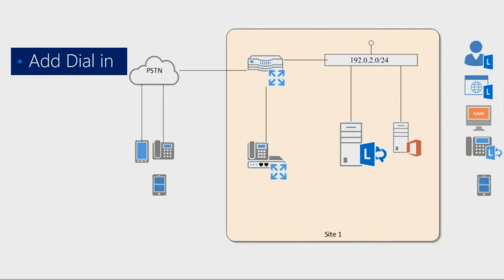But you'll also notice that there's this little puppy right up in here, which is called the gateway. That PSTN doesn't always have the ability to come straight into Lync. The OIP changes about every 6 months, I'm guessing. It's not updated as frequently as I'd like to see it, but that's the way it goes. I recently did a project with X5 where we got through the sales presentation part where it's yes, yes, yes, please sign here. And when we actually got around to doing it, we were halfway through it, and their tech said, "Oh, you need to have a gateway for this because we don't support it without it."